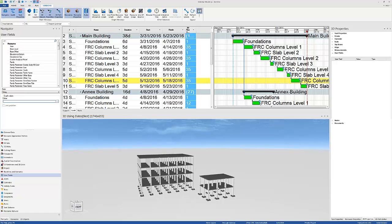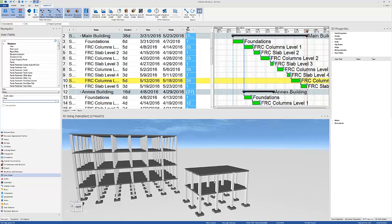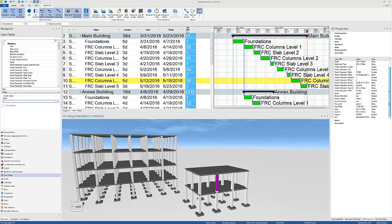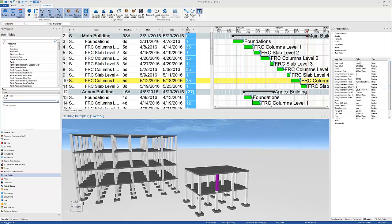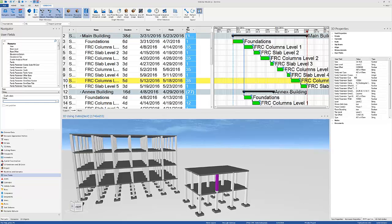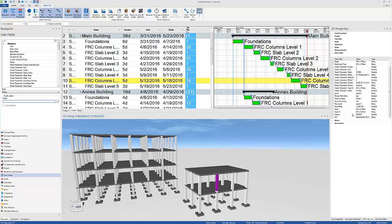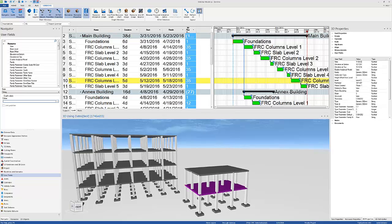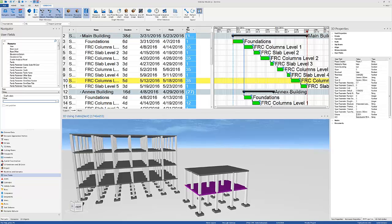Now if I click on any of these elements, this particular model came in from Revit, so these are the parameters that come in by default. But if you're using Navisworks or any other source, you still get parameters that you can use. If you look through these parameters, you can see that we can use the level for automatching, but we can also use the volume, which is there for the columns, the slabs, as well as the footings. We can use this parameter to forecast daily material quantities on site based on elements from our model.